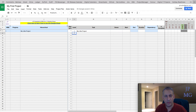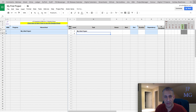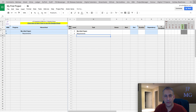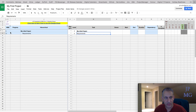Next I'm going to put my first real task or section of the project. I'm going to make this a level two, so we're going to start to build a hierarchy here. We'll call this "requirements." When I do that, you'll notice it indents and starts to build this work breakdown structure — one, one dot one, etc.